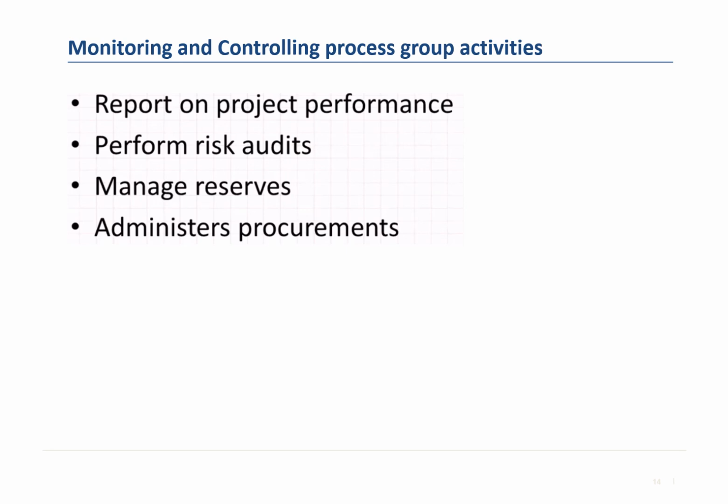During the monitoring and controlling process, you will also manage reserves. What a reserve is, it's a buffering timeline or funding that is allocated for the project, but the reserves will only be used if needed. Your effort is to manage your project within the baseline.